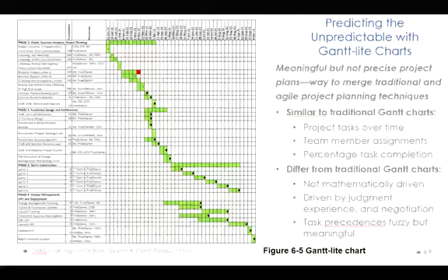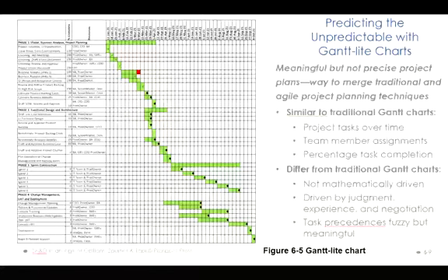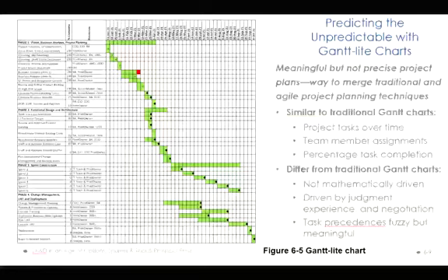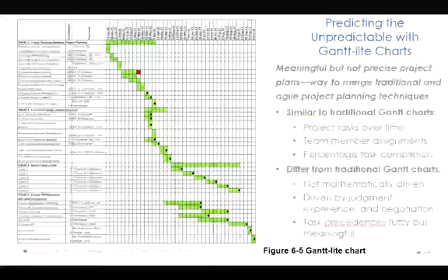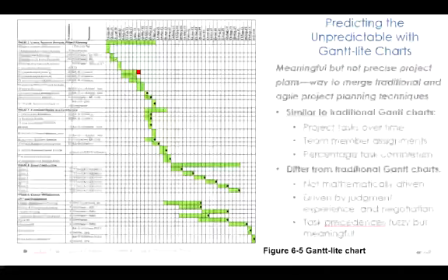It is a feasible method, and there is a new terminology your textbook introduced. It's called a Gantt light chart, and this light version of the Gantt chart includes some sort of human judgment. So you are using human estimates or experience to guess the range of time that a particular task needs to be performed.